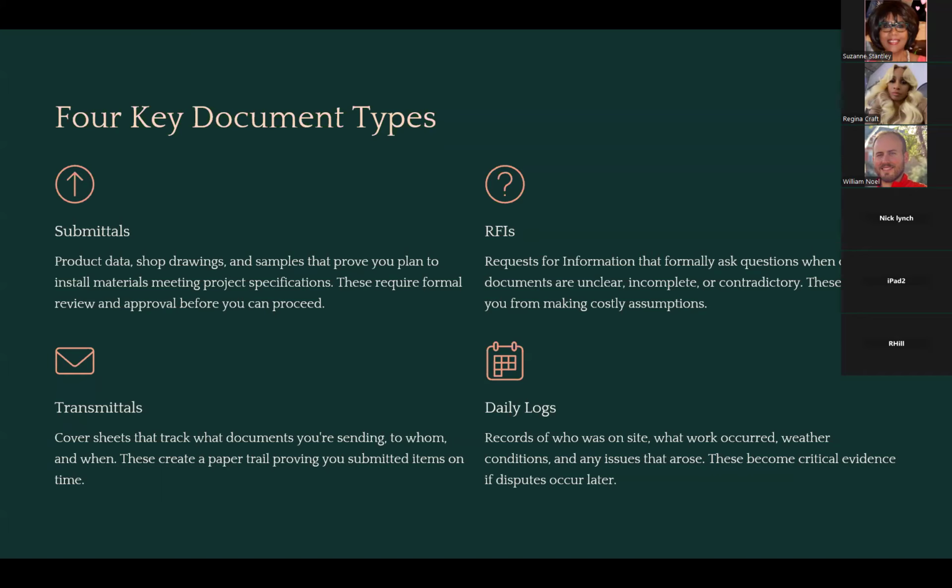But essentially, it is a cover sheet that says, hey, here's my submittal. Here's when I sent it, and this is you receiving it. This is how I sent it. I mailed it, or I emailed it, or I dropped it off at your office. This is who I sent it to. And it's just a formal documentation that you can keep a piece of because if one day that submittal gets lost or doesn't get returned to you, you have proof that it was actually turned in at the time it was turned in to who it was turned in to.